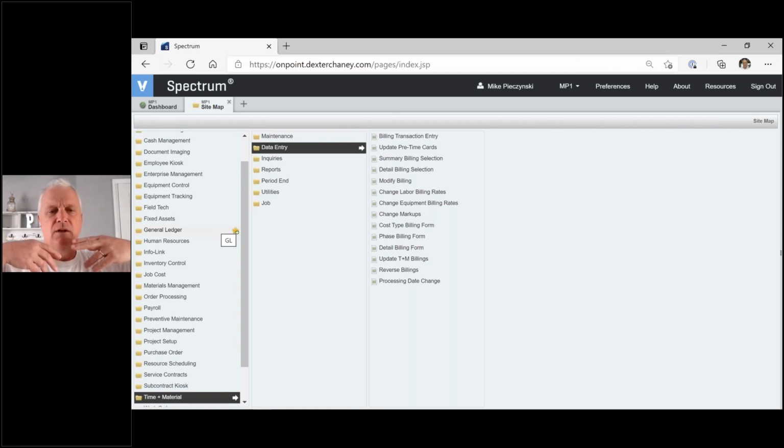So we're very consistent now. We quickly attach it to a change order, and then we attach that to the schedule of values when we're ready. And then that will add that $20,000 to the schedule of values so we can bill it. If this interests you, I realize there are a few steps to it. It flows though, and it's a lot faster than doing this manually, as well as taking a chance on mistakes. If you're interested in this and you want to walk through, give us a holler. Glad to walk you through it, show it to you even in your sample data that's relevant to you.